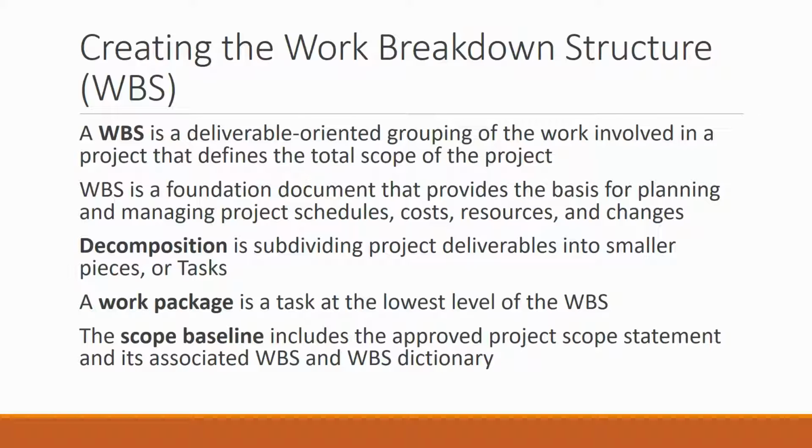So if a website is a deliverable, well, what do we need to do in order to get to the end deliverable of a website? Okay, so you start to decompose that deliverable of a website into all of the various tasks or activities that are necessary.